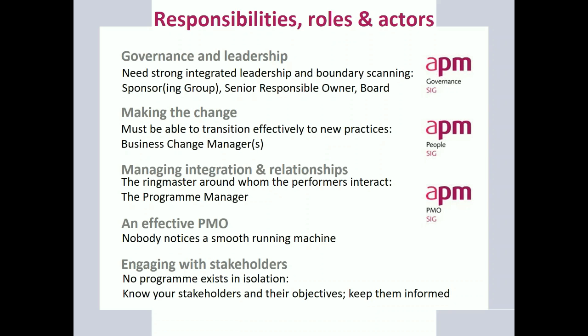It took 6 months before the contractor finally acknowledged that yes, they had a problem. Because the PMO had been able to do the analysis of the data, they had also allowed the program manager then to plan some contingencies that meant that resources were able to be directed towards the errant venue, and we were able to get it to be delivered on site.